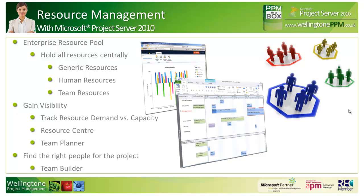Today our focus is very much on people, and within Project Server, people resources can be categorized as generic resources, human resources, and team resources. The generic resource is a skills-based placeholder resource such as a .NET developer, tester, or analyst. These allow you to specify the skills needed for a specific task before you know who's actually available to work on it.